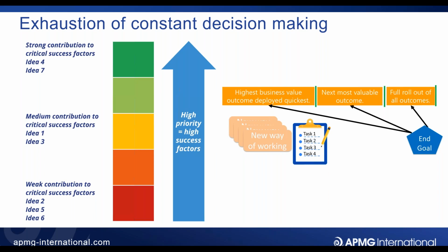That procrastination is a risk-averse approach. My job is to explain to them the risk of not making a decision. So what I do is I show them the impact if we do go ahead with creating this outcome, but I also show them the impact if they prevaricate and they hold back on taking the decision. I show them the impact that this team over here can't do any work because they're still waiting to hear from you. And this supplier over here is going to charge us additional fees because we aren't fulfilling our side of the contract because we haven't taken a decision.